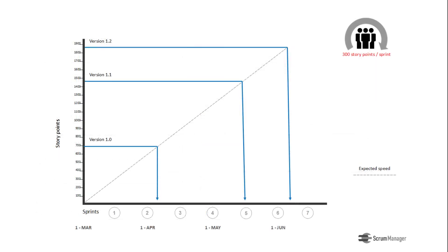The graph, besides visualizing the product backlog in delivery dates, is also a useful tool for monitoring the evolution of deliveries. To do this, it's enough to also plot the actual speed, sprint after sprint.